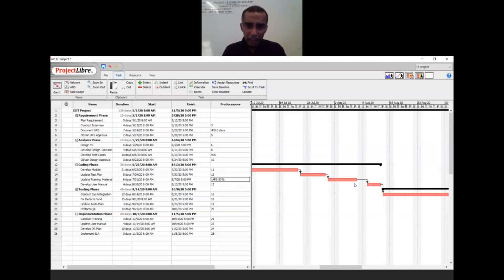When you enter like this, just notice this chart. It'll be 50%. So let me repeat this. It's currently a finish to start relationship. So I can say 14 fs minus 50%, and you'll jump like this. So it's 50% of the duration of item number 14.